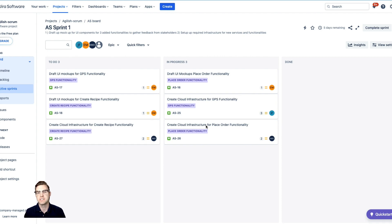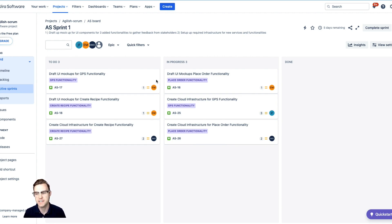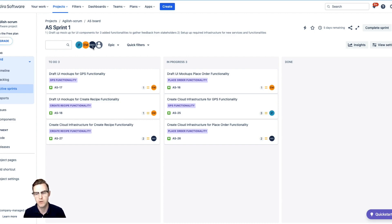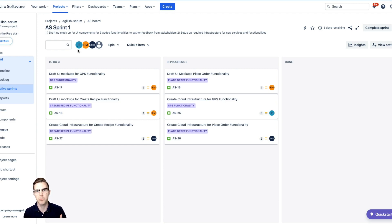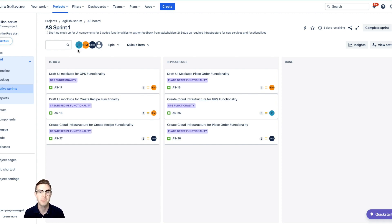Another item I like to use is round robinning. If you've ever heard this technique before, how this works is I hand it off to one team member and they hand it off to another team member, and it goes through that until you finish everybody. So you can see Emily is this person on this ticket. I'll give it to Emily, and Emily gets to choose who it goes to next. It might be Joe, it might be myself, until it gets to the very end. This also helps with making sure people are present. You have to understand who has spoken in the past to know who to pick in the future. I think it's a good technique I use all the time.